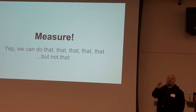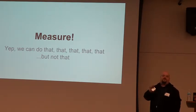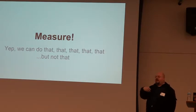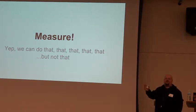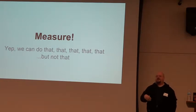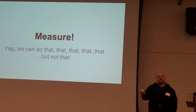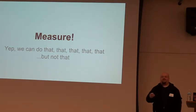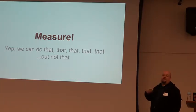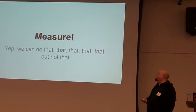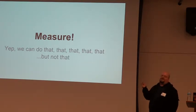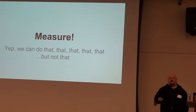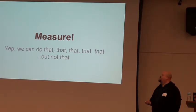But if you actually know, we can get five items done a week. This item we estimate to be about 15 items and Craig's on vacation for two weeks. So, I'm actually not going to get 15 items done, alright? Because he's going to be gone for two weeks. I'm just going to get 13 items done. So, okay, this is going to take three weeks and change for the extra two bits that Craig wasn't there to work on. You know, you can actually give a real, pretty solid value. And you'll find that over time, this actually gets to be, you actually get very reliable predictable numbers with this stuff. It's kind of crazy.